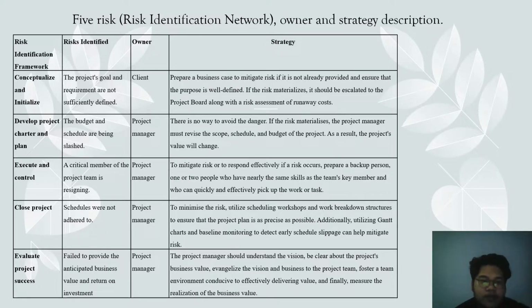Next, develop project charter and plan. The risk identified is the budget and schedule are being slashed. The owner of this risk is the project manager, and the strategy is that there is no way to avoid the danger. If the risk materializes, the project manager must revise the scope, schedule and budget of the project. As a result, the project's value will change.